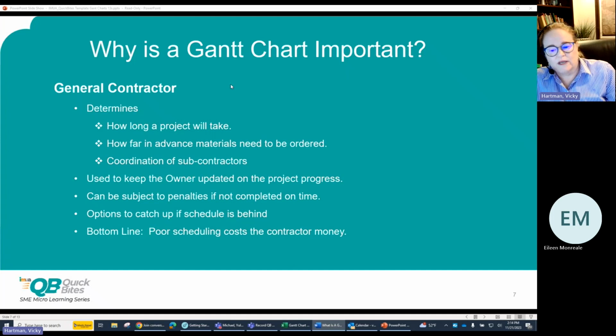There's a side effect of poor planning of a project. If you tell a subcontractor you'll be ready for their services, in our example Gantt, the roof is scheduled to start on 1/15/24, and the foundation hasn't been completed and the roofer can't start, that causes a problem. If the contractor misses the mark too many times with the GC, they may decide not to work with the GC anymore. Fewer bidders may lead to higher pricing for the subcontracted work, or the subcontractor may charge more to account for their wasted time.